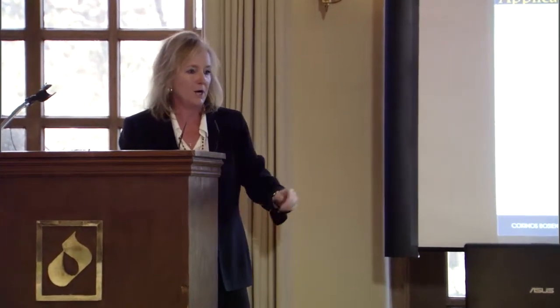So if something happened on a project where I was negligent or grossly negligent, and I caused the accident, and I had this indemnity provision with the subcontractor, we get in a lawsuit, the subcontractor would have to indemnify me. The second type of indemnity was what we call the limited indemnity, which was essentially, I would agree to indemnify you, Mr. General Contractor, for just my limited acts of negligence, and you would agree to take over your acts of negligence in the event there's a lawsuit. And the last one we had was basically everybody agrees to indemnify each other for their acts of negligence.